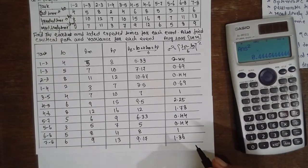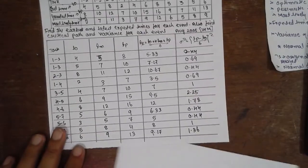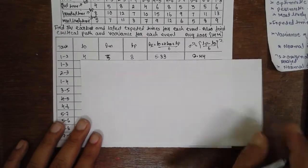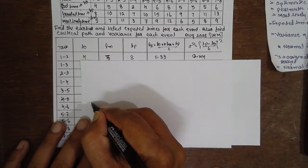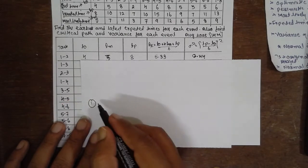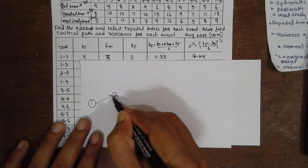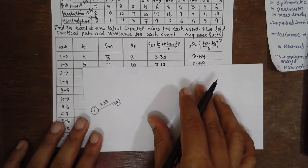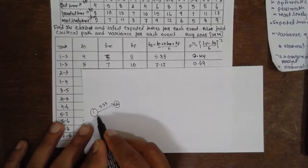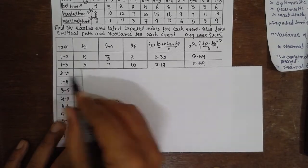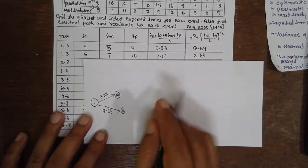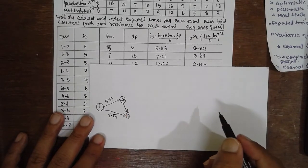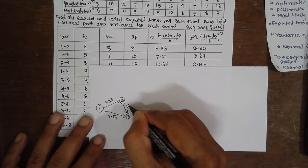After completing this, go for the network diagram. Draw the network diagram: node 1 connected to 2 with Te value 5.33; node 1 connected to 3 with value 7.17; node 2 connected to 3 with value 10.67.